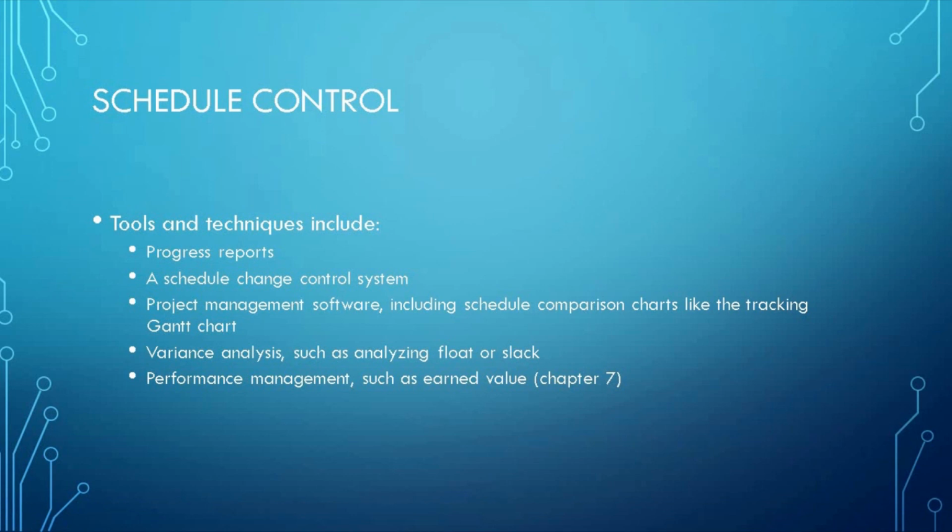Schedule control. It performs reality checks on schedules. It allows for contingencies. Don't plan for everyone to work at 100% capacity at all times. Hold progress meetings with stakeholders and be clear and honest in communicating schedule issues. The goals of schedule control are to know the status of the schedule, influence factors that cause schedule changes, determine that the schedule has changed, and manage changes when they occur.